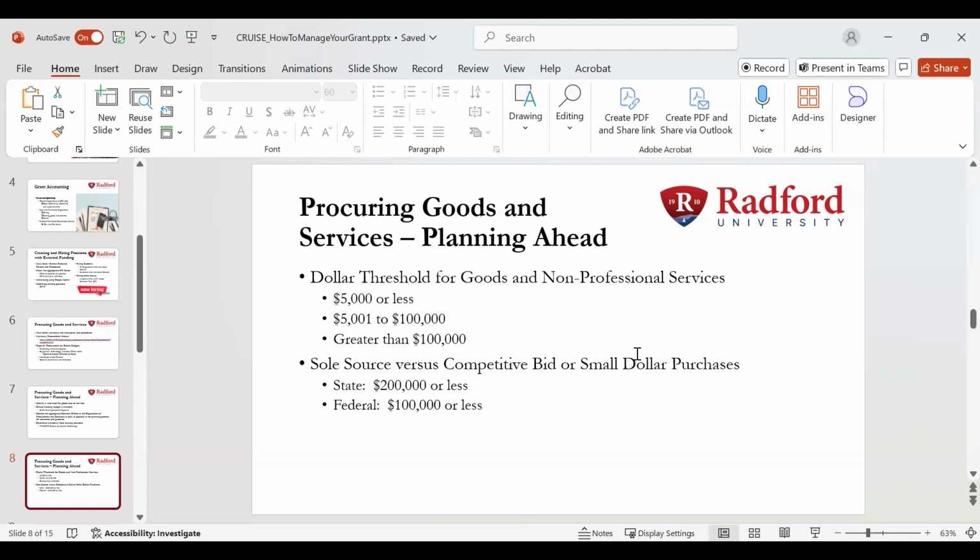The federal government, by virtue of giving you an award, has approved that. So what we tell faculty members in purchasing is, if you know who the vendor is, go ahead and write them specifically in the grant. Usually that goes in the budget justification. You could put it in the narrative depending on how you're going to write the grant, but usually those things go in the budget justification.